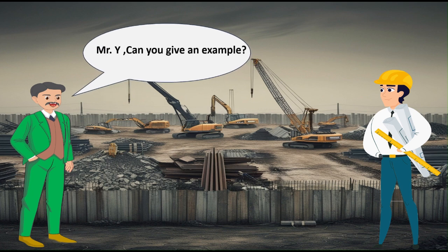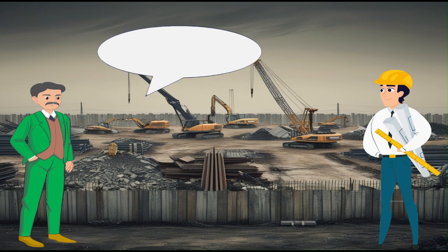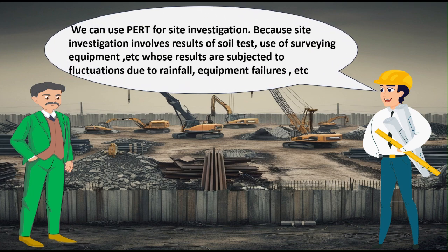Mr. Y, can you give an example? We can use PERT for site investigation. Because site investigation involves results of soil tests, use of surveying equipment, etc., whose results are subject to fluctuations due to rainfall, equipment failures, etc.